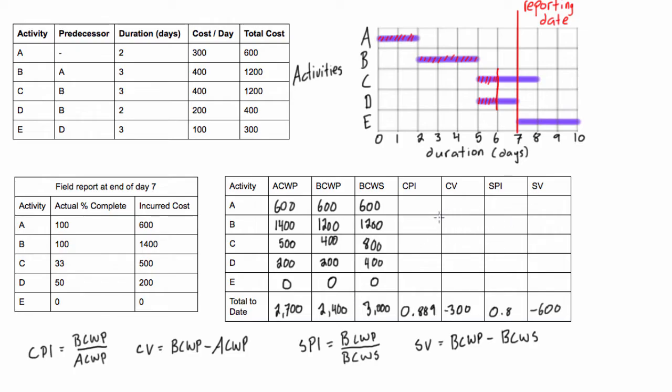But if you recall from that video, we figured out based on our cost performance index and cost variance that this project was over budget because the CPI is less than 1 and the CV is negative. Both of those things tell us exactly the same thing - that this project was over budget.